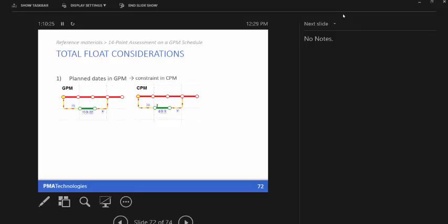We still have 9 days of float, but we only have a total of 9 days of total float. So, there are a couple metrics in DCMA that specifically look at total float. So this is just something to keep in mind. Maybe you open up a different DCMA metrics analysis tool, and it gives you a slightly different result based on Schedule IQ or a GPM schedule. So these 3 metrics are using this in their calculations.